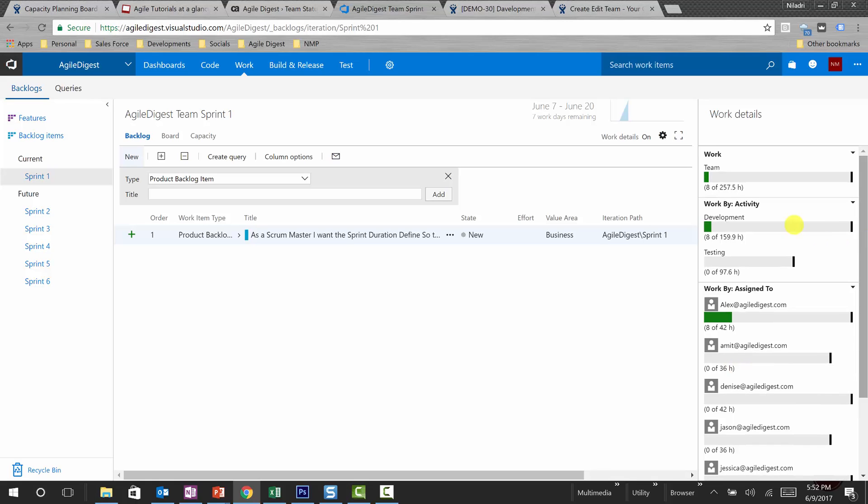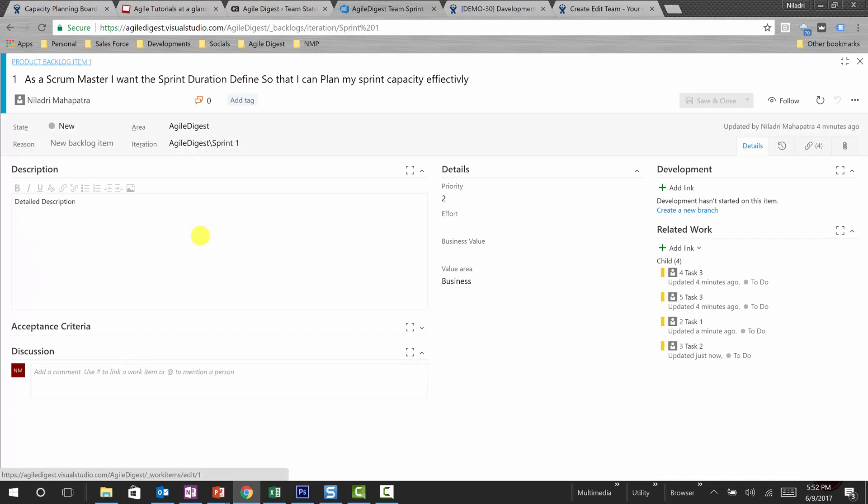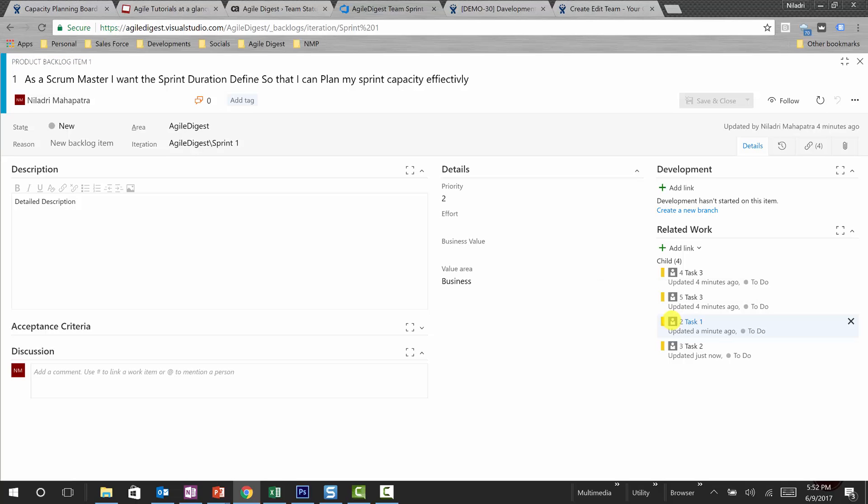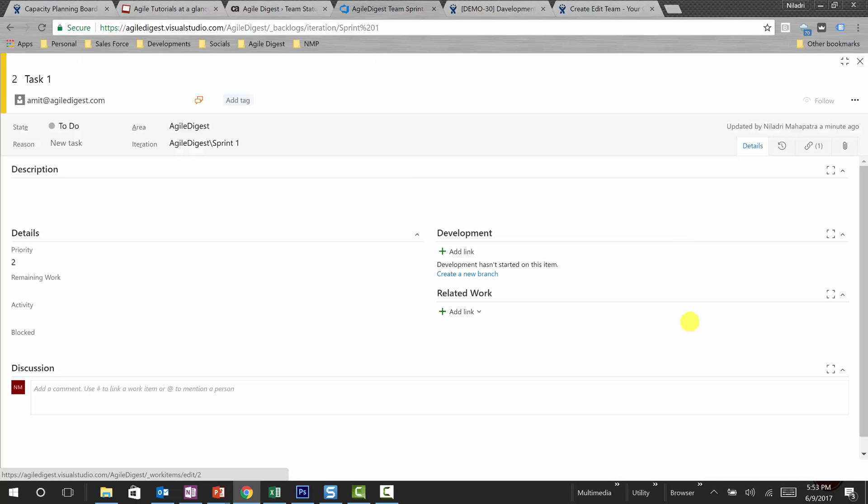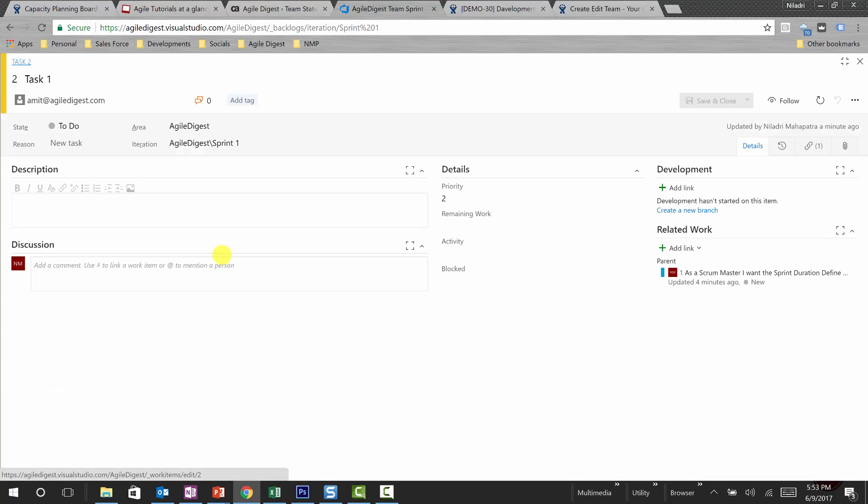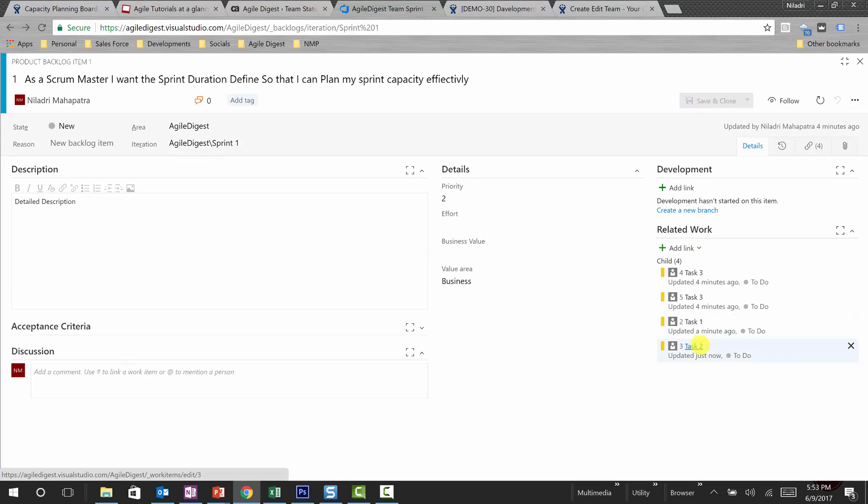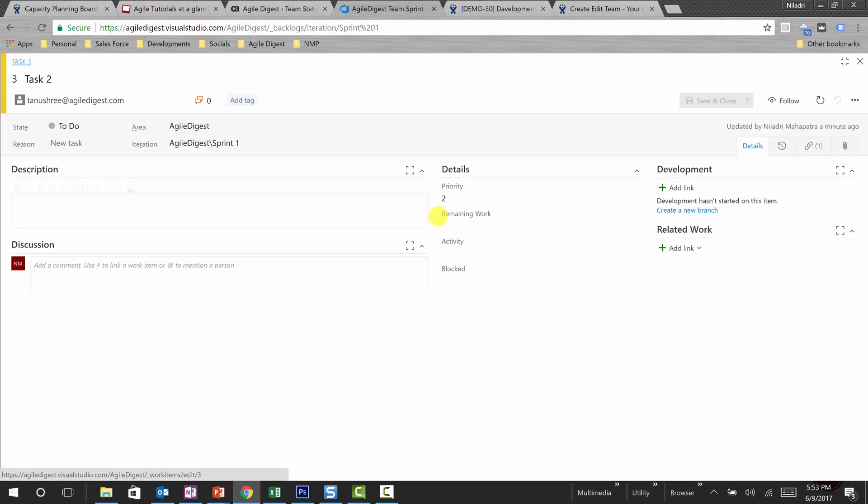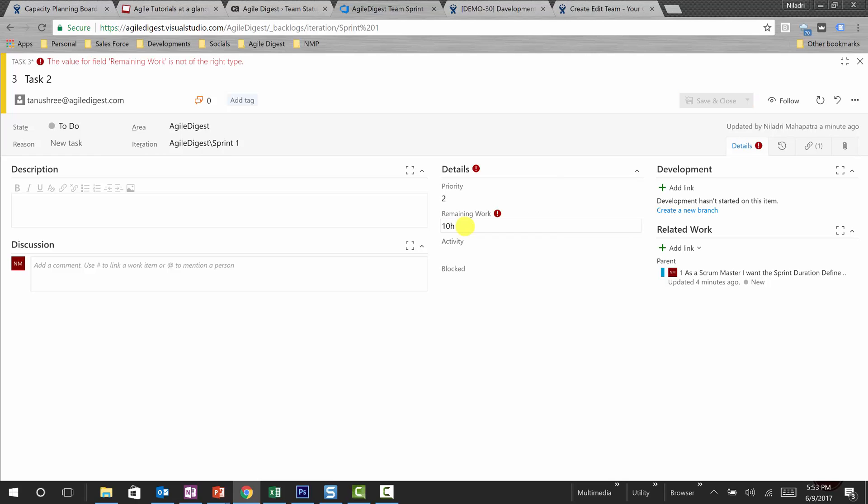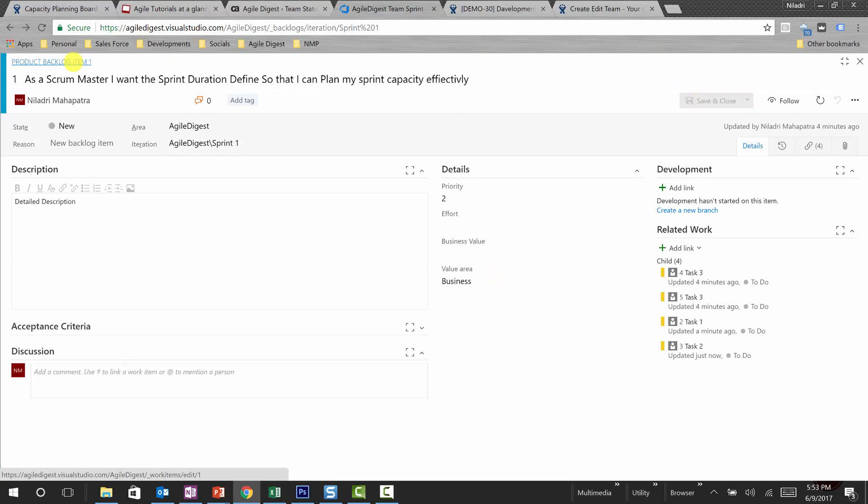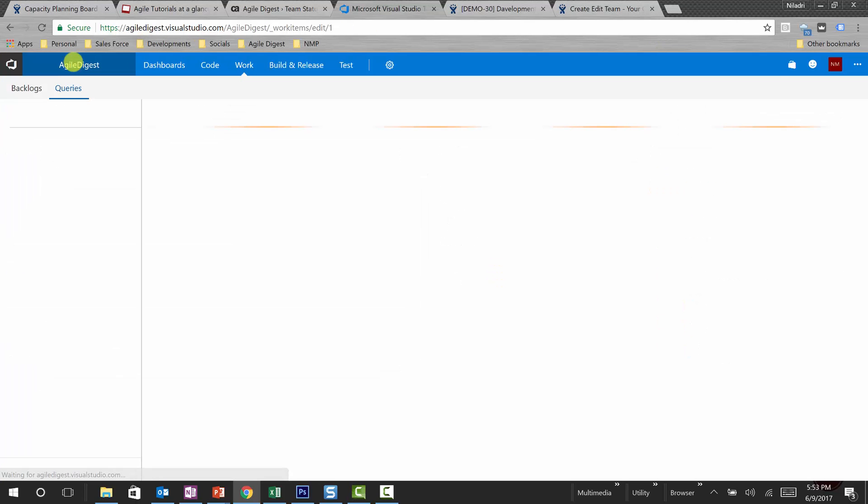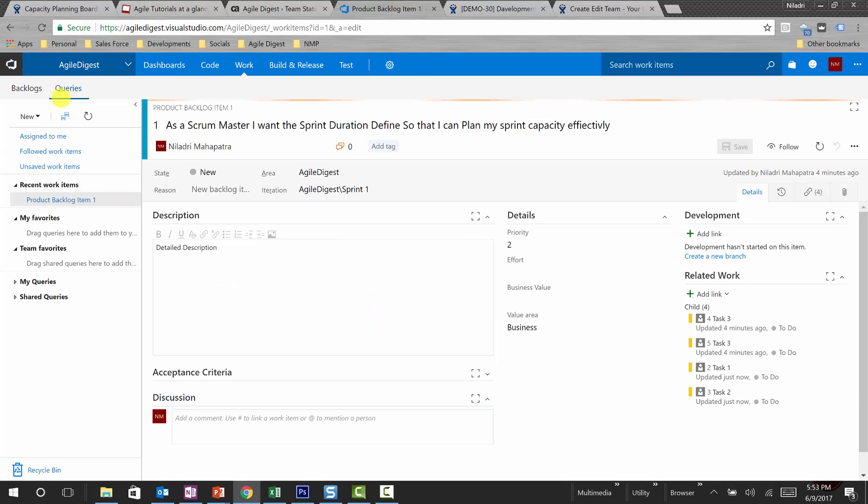And this is your capacity. If you look into it, I didn't save it yet. Amit is still saying zero hours, total eight hours has committed. I have to save that. Over here, these two tasks are assigned to Amit, but we have to make some estimated effort. What is the estimated remaining work? I'll say this is five hours of remaining work for this one, save and close. And for this task, I will be saying this is ten hours of remaining work, save and close.